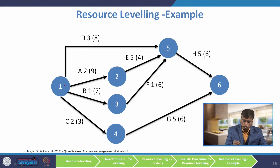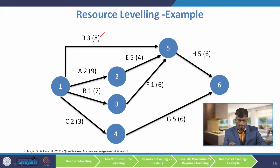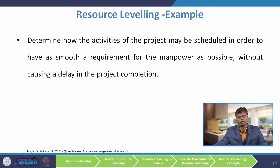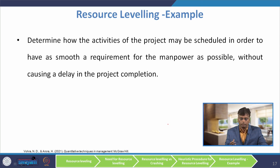There are activities 1 to 5. Activity D has a duration of 3 units of time and a manpower requirement of 8. Similarly, activities A, B, C, E, F, G, and H are given. We need to determine how the activities of the project may be scheduled in order to have as smooth a requirement for manpower as possible, without causing a delay in project completion. So we have to find the correct project schedule such that the manpower requirement is constant with no high variation.